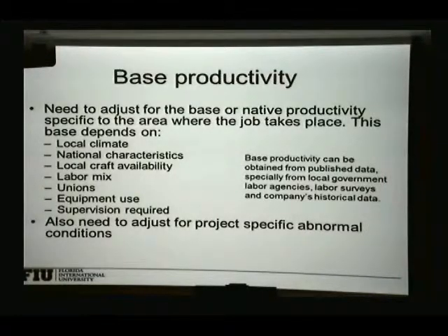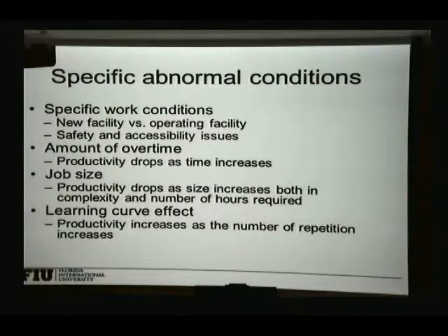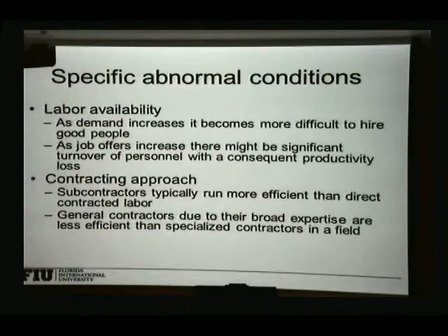In reality, you get that from experience, you get that from your subcontractors, depending on how far away you are from the source of materials, the location of the work, how many trades you have on the site. There are a lot of things that go into productivity. Actually, there's a complete course on productivity in construction. So we're just going to base it on the numbers given to us by the cost data. If there are any abnormal conditions that will change the time and the cost for your estimate,